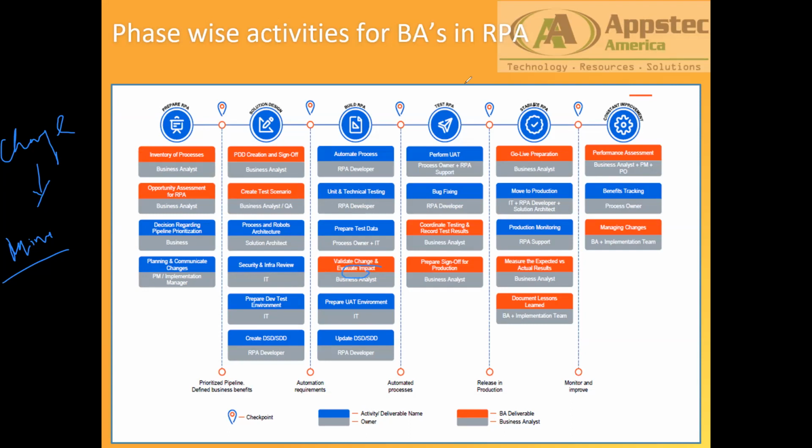Now coming back to the test phase. So remember the test scenarios which you created here. These test scenarios will now be utilized here to perform the UAT. So performing UAT, generally business analyst does not do the UAT. Business analyst coordinates the UAT and records the result.